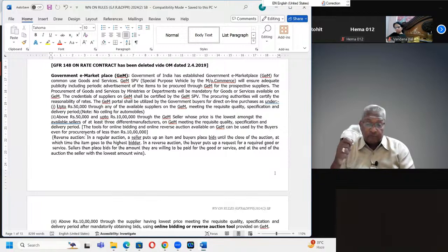सप्लायर्स को डायरेक्टली अप्रोच नहीं करेंगे, ओपन टेंडर इश्यू करेंगे। Those registered with the GeM can only quote. It is not open tender. It will be a tender notice that can be seen and downloaded, and then the quotation can be sent. Bid or tender can be filed by those registered suppliers only.